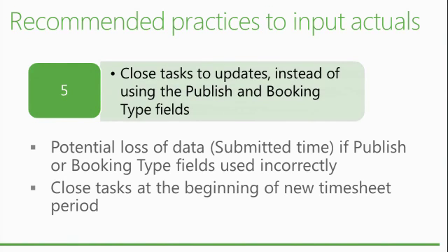But basically what's going to force you is to create either multiple projects or multiple tasks with fewer people and shorter duration, that type of thing. So yeah, it will generate more work. Where do you see the performance issues? It's hard to say, but yeah, it's true that when you have very long duration. Is it when you open the project plan? Yeah, it could be when you open, when you save it.